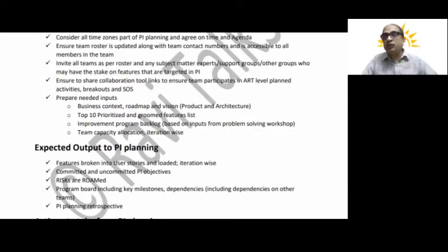The reason being, if you keep adding new user stories during execution, that is going to be another anti-pattern. Why? Because again, you need to estimate it, and then it might have dependencies on other teams as well. That's why feature backlog grooming is very, very important.